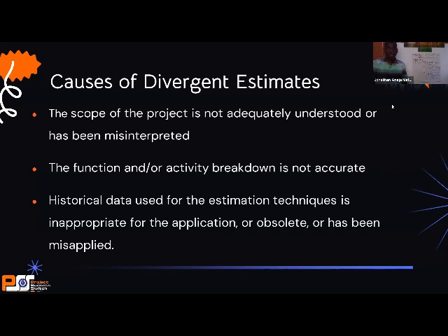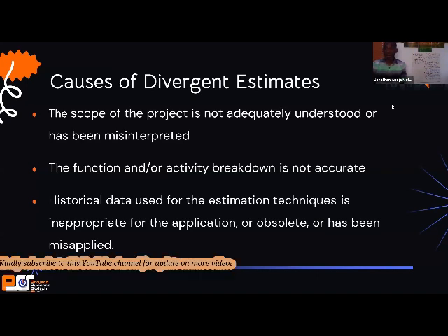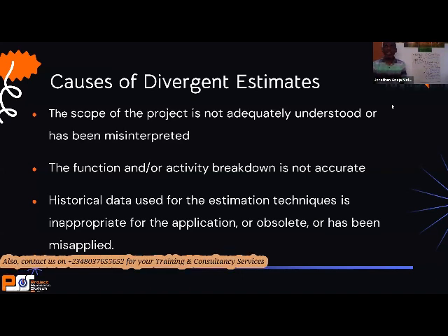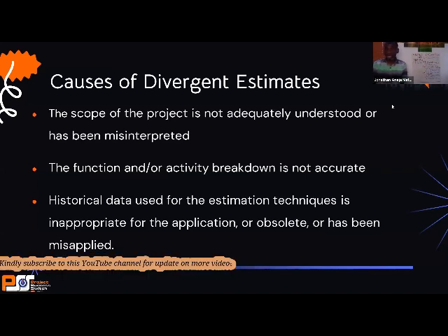So what I did was, when we did that work, I think we spent, if I'm not mistaken, maybe about 8 million on the drainage work of the site. So I said, okay, if I spent 8 million to do 3 hectares, site and services, and I want to do site and services in the same environment, the sites are close to each other, let me just prorate. And I prorated, and I think I got 5.something million, 5.4 or so to do 2.2 hectares.